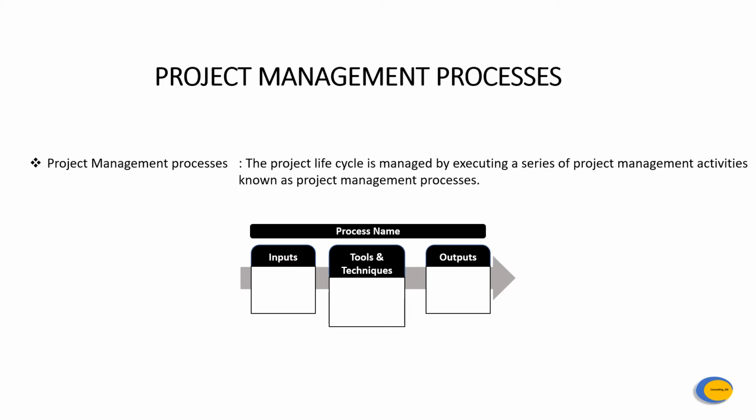There are processes that are used once in the project, such as develop the project charter. Other processes are performed more than once, such as acquire resources. Others are performed continuously, such as define activities in rolling wave planning.